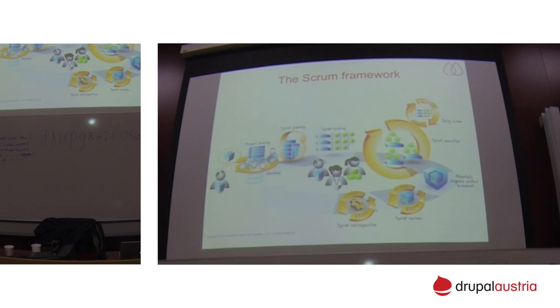Then, at the very end of the sprint, they have a demo, and they have this potentially shippable incremental product. They do the demo in front of the product owner, who is capable of providing feedback right away. And here we go. Then this team has the retrospective. The demo is the sprint review, and in the retrospective, they talk together with everyone involved in the process about what went well, what doesn't go so well, and what can be improved. So the idea here is that they have the inspect and adapt process in place.